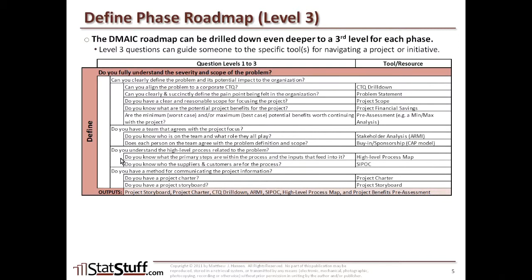Then you move on to the next questions. The third-layer question is: Do you know what the primary steps are within the process and the inputs that feed into it? A high-level process map is what might guide you with that. The next question is: Do you know who the suppliers and the customers are for the process? If you're not really sure, the SIPOC is what might help you in answering that. Once you've moved on, you can go to the last layer of questions.